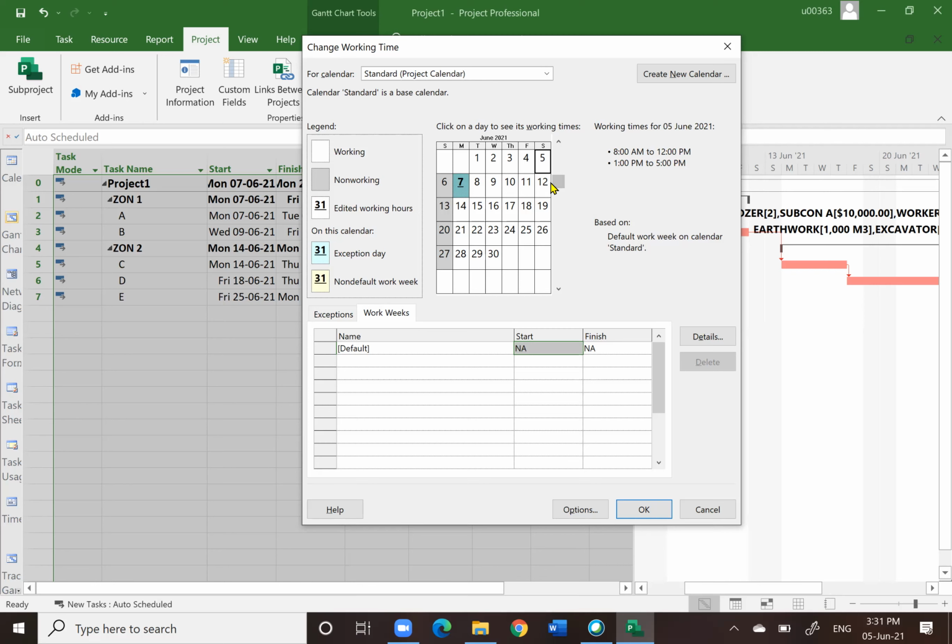Even though your calendar dates and everything are correct, the computer will notice how many working hours you spend on a day, and at the end of the day it will give you different work hours based on the calculation. So you should be aware of the setting.